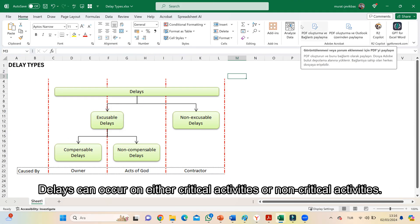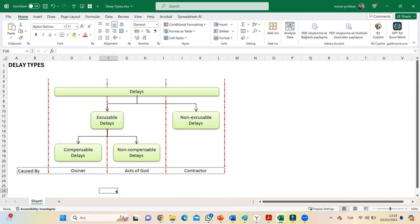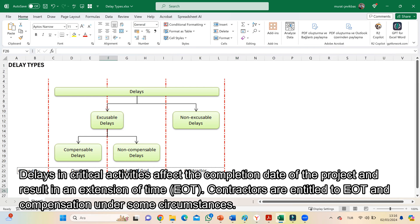Delays can occur on either critical activities or non-critical activities. Delays in critical activities affect the completion date of the project and result in an extension of time. Contractors are entitled to EOT and compensation under some circumstances.